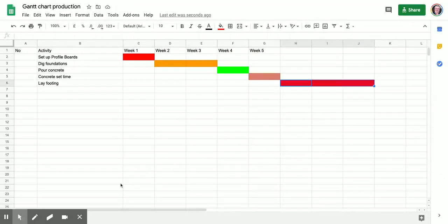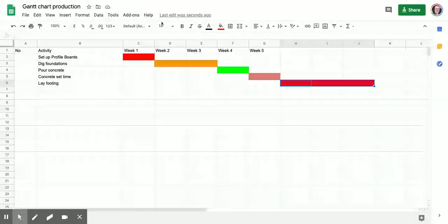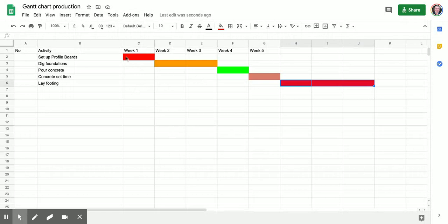Now, when I was talking to you about this, I was going on about how we could look at what equipment and what materials would be needed for each week. So down the bottom here, I've been looking to put down, as I'm doing this, what equipment and what materials would be needed and the quantities. So I'll go back into another video, but just bear in mind, I need to understand not only what time is required, but also down the bottom here for each week, what materials I will need for that week so I can make sure that I pre-order with my supplier.